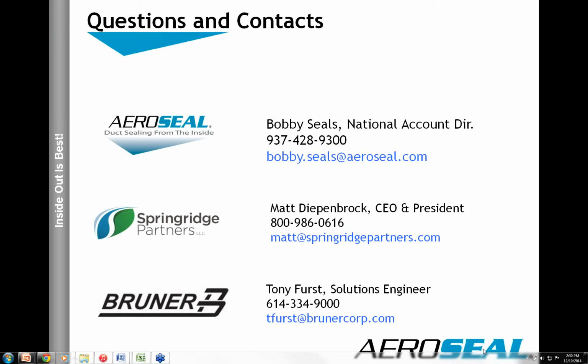If you do an exhaust or make-up air, the labor is not intensive, right? It should be simpler. It's a lot simpler. You aren't going up above the ceiling and blocking VAVs. You're just going to a 4x6 exhaust grille and blocking it. So the labor is less intensive, so the price per CFM would be less, but then again, it depends. And I know that's the proverbial engineering statement. So now then, what does it usually range in a simple ROI aspect?